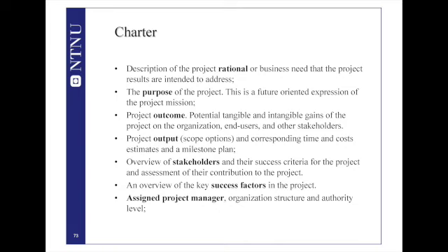After the purpose, you define the outcome. And the outcomes here are the tangible and intangible gains of the project. What do we gain when I achieve this mission? What are the good things that I can gain so that I can force them through?